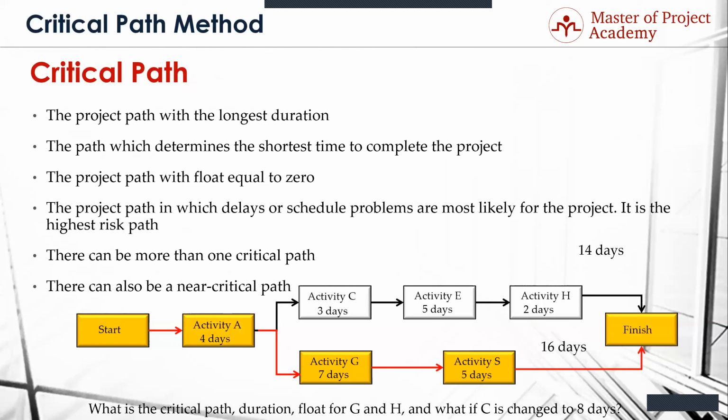And you see how that can happen in a dime? I mean, you're just working along in a project and something changes because of whatever, your critical path can change. Which changes everything. And this is a moving target. So how often do you check the moving target? That depends on your plan for schedule management. I say no more than once a week, but it could be every 2 weeks because things will even out. If you want to micromanage, you can check it every hour if you want, but I do it about 2 weeks.